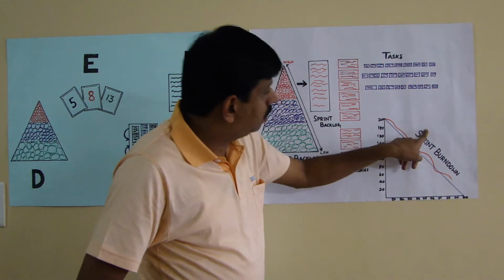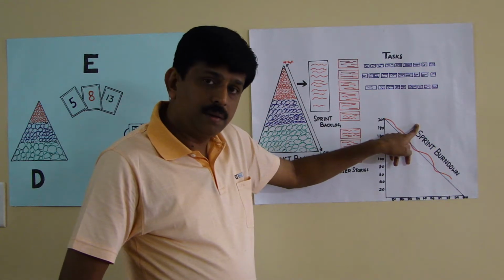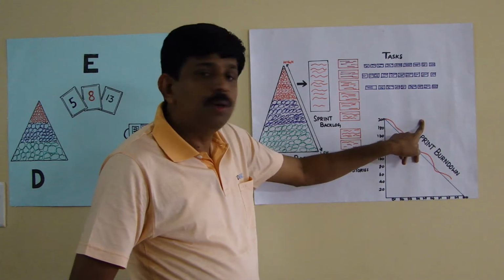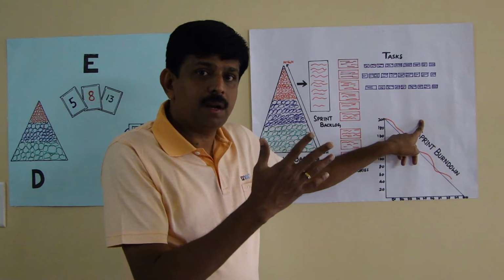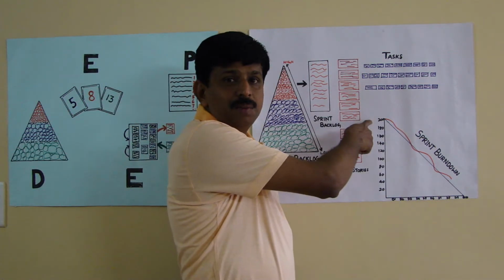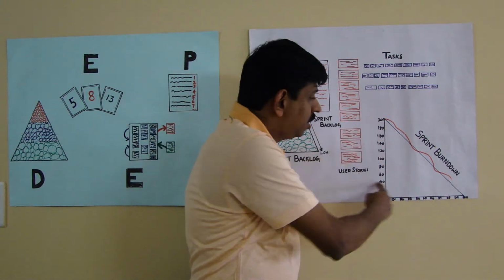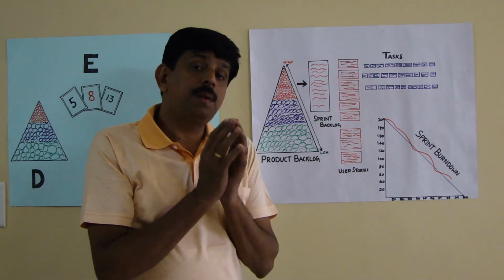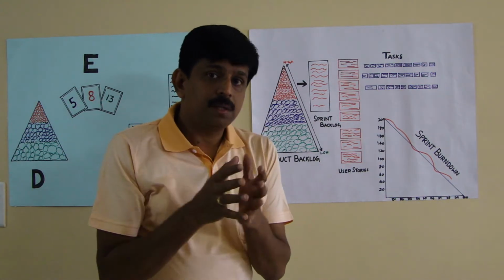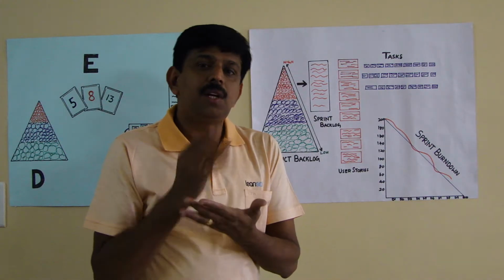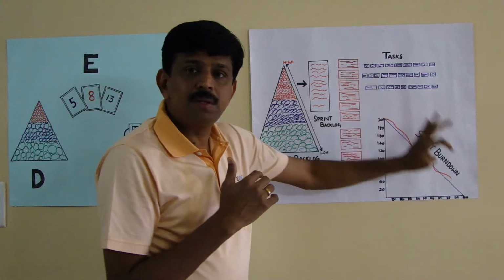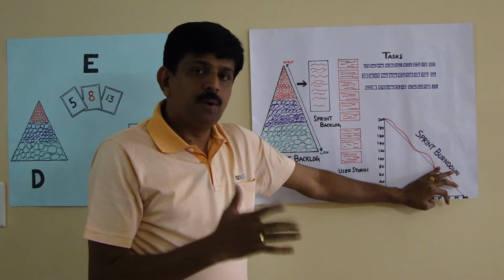What if there is a gap like this? It goes as a straight line, right? Horizontal line. That means we are stuck somewhere, that we have to burn 200 hours. It's possible that we have spent 50 hours, but we still have 200 hours because nothing has been completed. Right? So burn down is the third artifact that explains and helps us to measure our project tracking on a daily basis. That's the beauty of Agile. These three artifacts help us so well to build a good product.